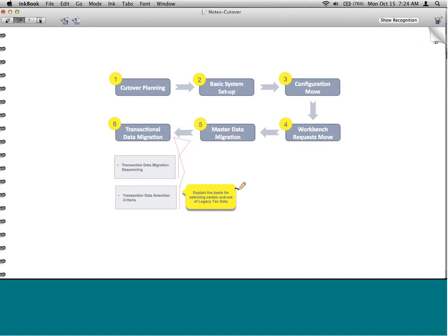Like I said, the basis for selecting a subset of data, the minimal set of data, will be live data first. Meaning anything that is still live, meaning an order that has not been delivered is live data. An order that has been partially delivered is live data. An order that has been delivered but not billed yet is also live data. Right? Order, delivery, billing, if that is complete, then it becomes dead. All we need to do is collect payment. That's it. That data need not be migrated generally, unless the user specifically asks you to migrate.